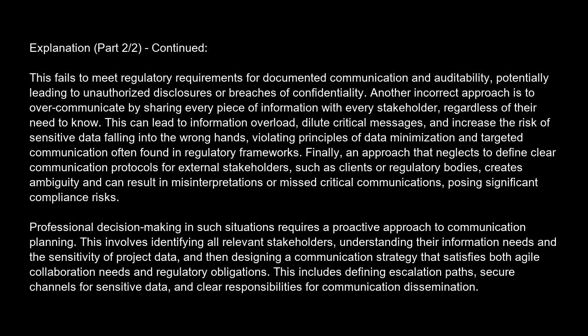Professional decision-making in such situations requires a proactive approach to communication planning. This involves identifying all relevant stakeholders, understanding their information needs and the sensitivity of project data, and then designing a communication strategy that satisfies both Agile collaboration needs and regulatory obligations. This includes defining escalation paths, secure channels for sensitive data, and clear responsibilities for communication dissemination.